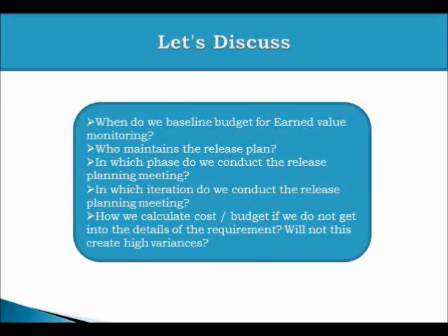Now, depending upon the expertise of your team in a given area, the variance could be high or low. So if you have done similar projects, your variance would be low. If you have not done the project, your variance would be high. If you have done the project, your velocity data will also be stable data because you do have historical information for the same customer, same technology, etc. So irrespective of the methodology, you will have variances, and this release plan is good enough to give you first information about the cost which is going to occur in your project.